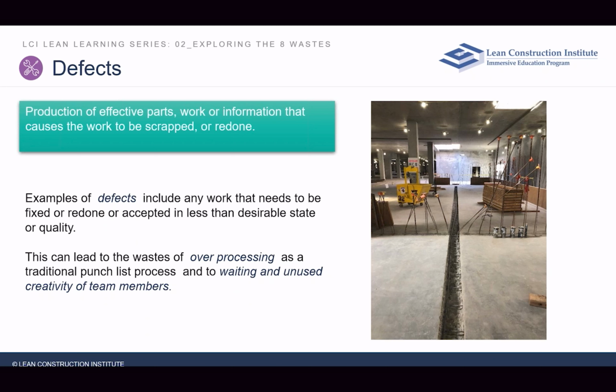The drywaller is then putting drywall on a defective wall. So they hurry up, put the drywall up without taking care. They got screw holes that are too deep, not aligned properly, whatever you want to call it. And then who gets that work product when they're done? The taping company. But they're from the same company still. The stud framer, the drywaller, and the taping guy are all from the same company. And if the defect started with the person installing the metal studs, continues with the drywaller, continues with the taper, we've now created layers upon layers of errors and defects.